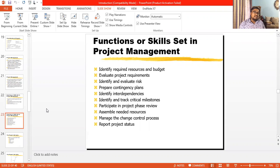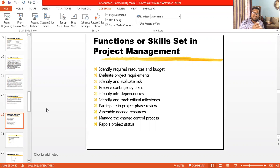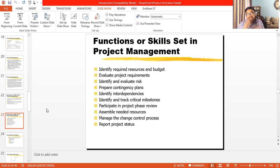Project management will help you identify interdependencies — which tasks come first, which come second, which department is related to another, and what degree of dependency they have. You can identify all this earlier. For example, you cannot start task number 10 if you have not finished task number six or seven. Project management helps you properly identify interdependencies between tasks and departments.